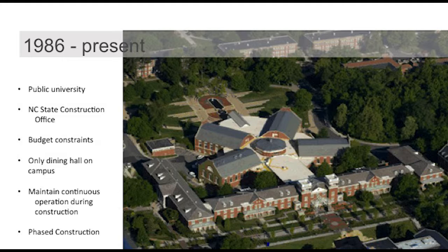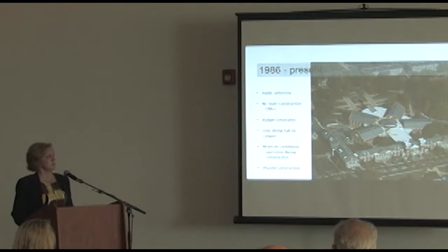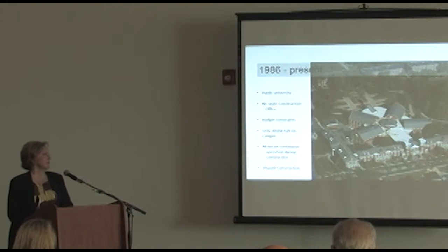We answer to North Carolina State Construction Office, which is our jurisdiction controlling all codes and everything. There were clearly, as in most public projects, budget constraints that had to be contended with. I mentioned it's the only dining hall on campus. They had to maintain continuous operation, three meals a day, 1,200 plus students per meal, while our complete renovation happened. No breaks, no shutdowns. And that, of course, required phased construction.